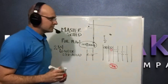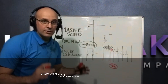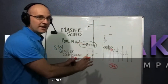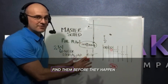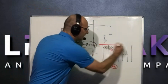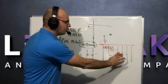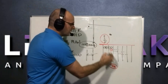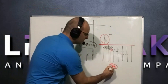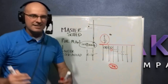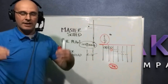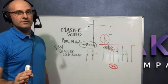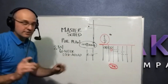That goes back to the promise — how can you reduce interruptions in the field? It's to find them before they ever actually happen. You use this make-ready look-ahead format, ask if it's ready, and if it's not, that becomes a potential roadblock that you fanatically track, remove, and fix before it ever interrupts you in the field.